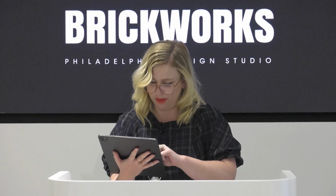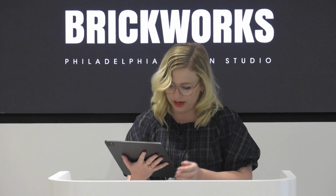Okay, another question here from Megan. Are there minimum quantities for custom orders? Yes, so if you're looking to do a custom color or maybe a custom finish, we are able to offer those. So for a custom order, you're looking at a minimum of 15,000 square feet. If you wanted to do, say, a custom glaze color, say maybe you're working on a high school or a university and you want to bring the school colors into the project and you want a specific color that you want to match, there's a minimum order quantity of 15,000 square feet to get any custom colors for your projects. Similarly for the baguettes, 15,000 lineal feet of baguettes for any custom colors in the baguettes.